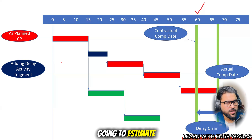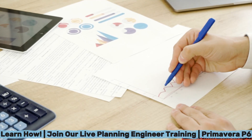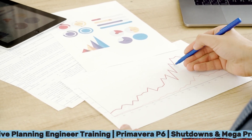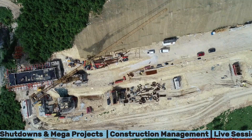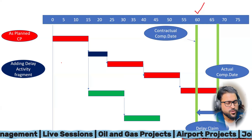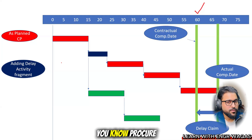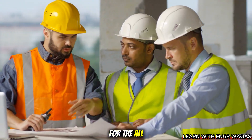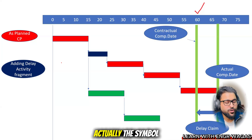When you estimate your project cost for a one-year duration, you account for cranes, labor, welding plants, batching plants, materials — all within that timeline. If the project extends by 15 days, one month, or two months, it's not only a time extension — it also becomes a cost liability. For that extra period, you still need materials, manpower, and services, incurring additional costs. That extra cost represents a loss.